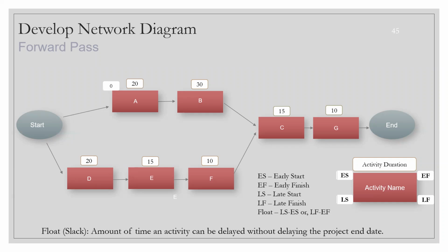Or a little bit more than that, because I'm only calculating the working days, but let's say all the days are working. Then I start on 1st September and finish on 20th September, right? So I add 0 as the early start, and I add the early start to the duration. 0 plus 20 is 20, and that will be my early finish.